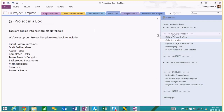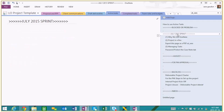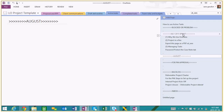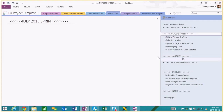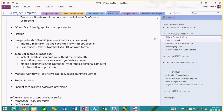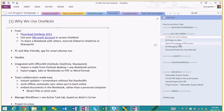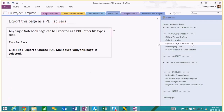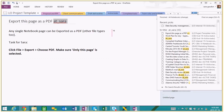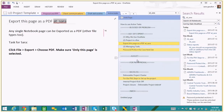This is where the action happens in a notebook — the active task section. This is where we grabbed from the Almeer's Corner video on how to use OneNote for task management. It's pretty basic but it works quite well. We organize sections using little arrows to give a visual distinction. We create different sections based on timelines — so if your project is a year and every month you have certain deliverables, you might create each month as a different timeline section. Each of the pages below are tasks — one page is one task. Tasks are assigned to a person using 'at underscore their name' at the end of the page title.